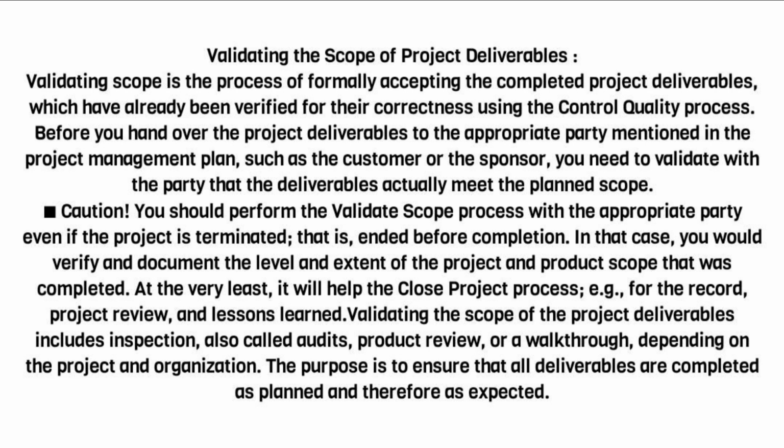Before you hand over the project deliverables to the appropriate party mentioned in the project management plan, such as the customer or the sponsor, you need to validate with the party that the deliverables actually meet the planned scope. Caution! You should perform the validate scope process with the appropriate party even if the project is terminated, that is, ended before completion. In that case, you would verify and document the level and extent of the project and product scope that was completed. At the very least, it will help the close project process, e.g., for the record, project